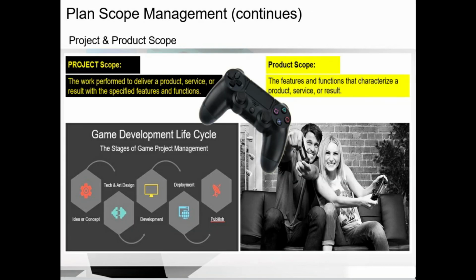Last, we are going to discuss product and project scope. Product scope means the end result. Example, a new airport terminal that meets all the technical specifications compared to the product requirements. Project scope delivers the product scope. Example, a new airport terminal that meets all the technical specifications plus all the work needed to deliver the terminal. Project scope includes planning, coordination and management activities that ensure the product scope is achieved.